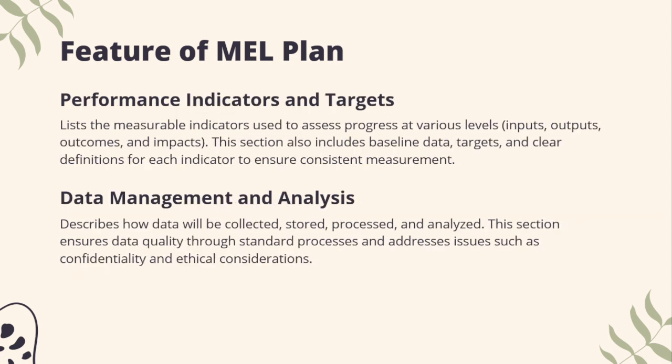The other feature is performance indicators and targets. Every MEL plan should have performance indicators and targets. In this section, you have to list all the measurable indicators used to assess the progress at various levels. So you're going to have the input indicators, the outcome, and the impact. In this section also, you need to document your baseline data and your targets. You also need to have clear definitions for each indicator.